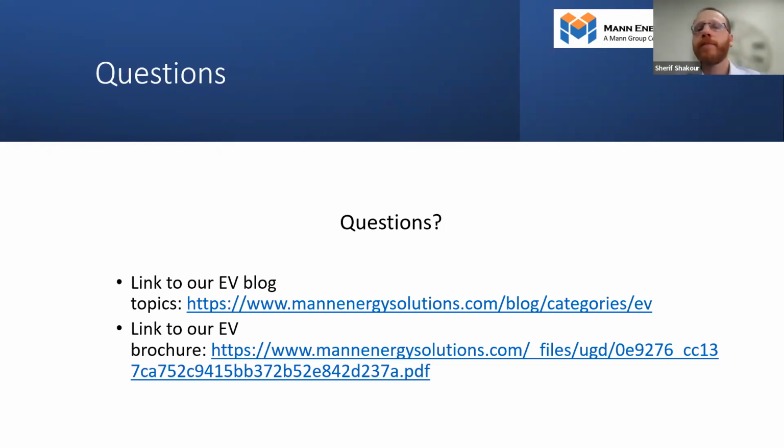It depends on the size of the system, but the initial study will take anywhere from 4 to 6 weeks. The next step would be the tendering process. If we go the tendering solution, it can take another 3-4 weeks. And then the installation typically depends on how smooth the permits, ESA permits and access process goes. It could take another week or two, provided that equipment can be procured without delays. So I would say it's a 3 to 4 month process in total.